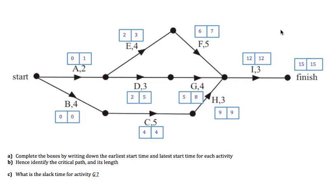We've now completed part A, filling in all the boxes with earliest and latest start times for each activity. We're now looking to identify the critical path and work out its length. Activities on the critical path by definition have no slack time — their earliest start time equals their latest start time. The path containing activities where these match is clearly B, C, H, and I. So that is the critical path.